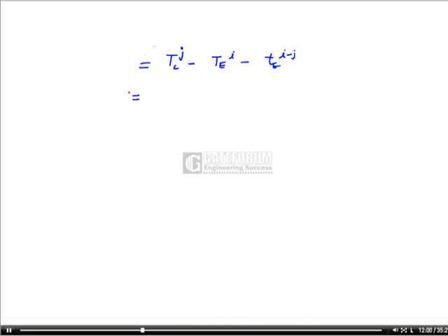So this can be rearranged as follows: TL of J minus T of I minus T of IJ.